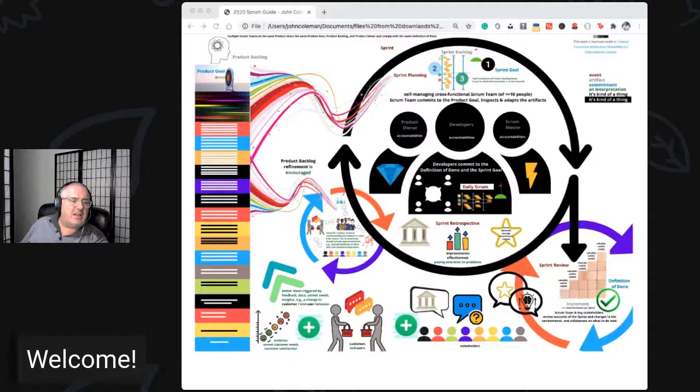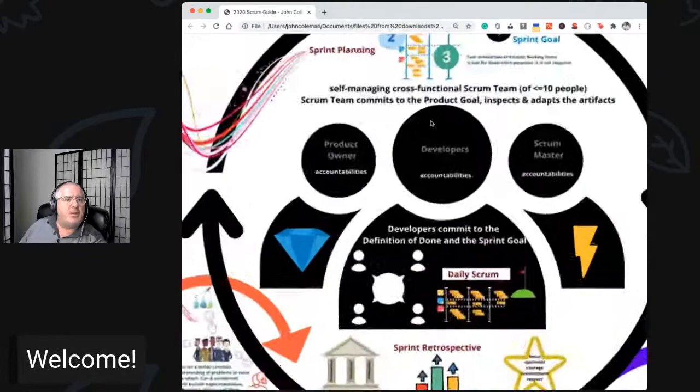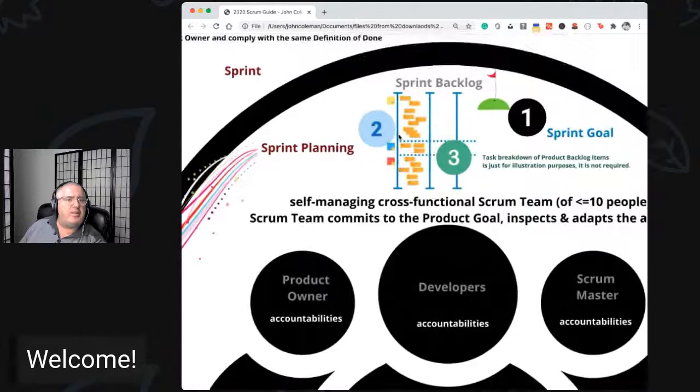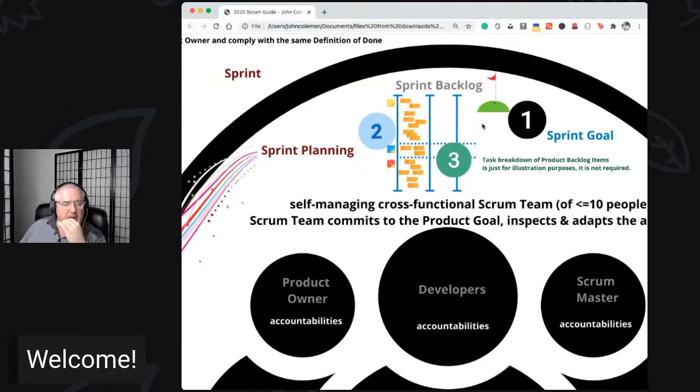In the visualization you can see the rhythm of the team — work moves off the top of the product backlog into sprint planning. In sprint planning we now have three topics, whereas the 2017 guide had two. I'm using the metaphor of a golf flag: what's our goal for the sprint — our business objective? Then what are we doing, and how are we doing it?